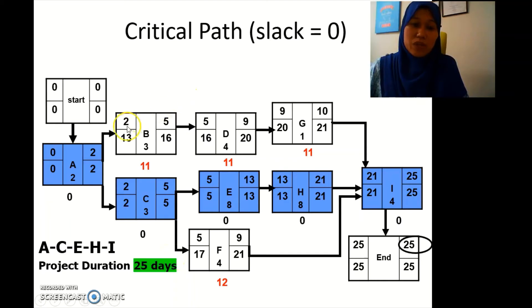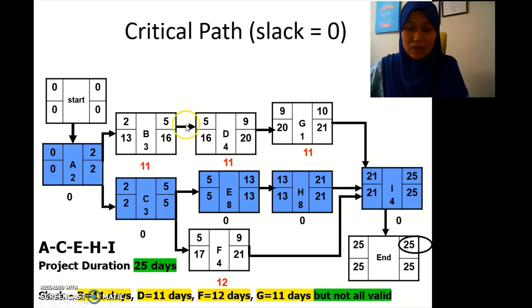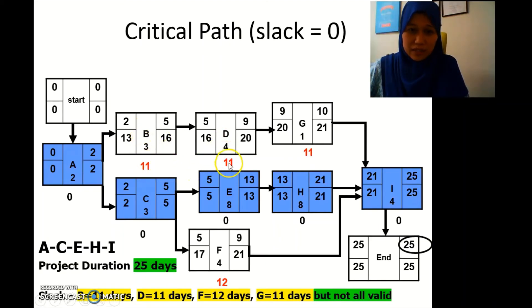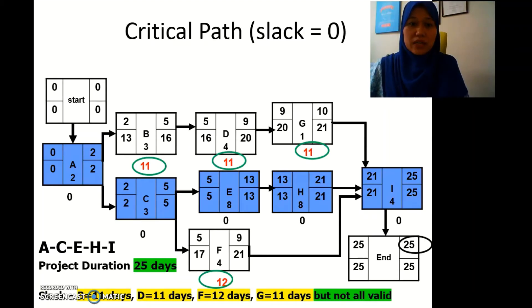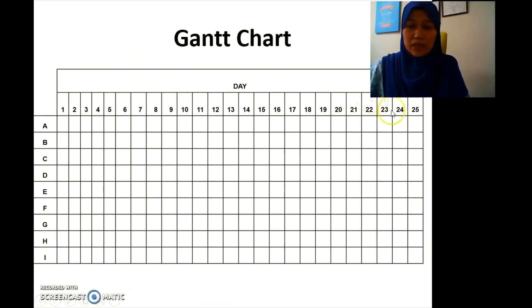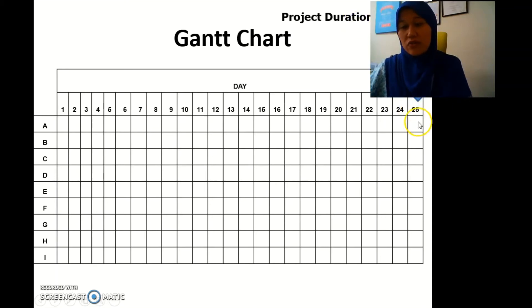Next we determine which activities have slack — meaning there's a balance when you subtract bottom from top. Those are B with 11, D with 11, G with 11, and F with 12. But not all slacks are valid — we have to check the validity of the slack using the Gantt chart. The Gantt chart spans 25 days.